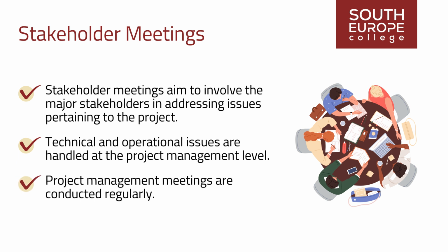Project management meetings are conducted regularly. Bipartite or tripartite meetings are held once a year, with additional meetings if the need arises. Reports are prepared on all of these meetings.